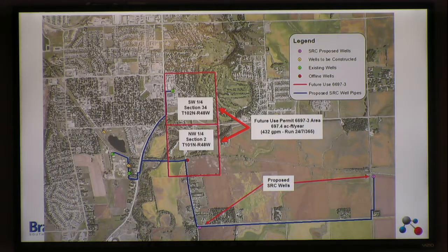This shows the location of the future water rights for the Split Rock Creek Aquifer. And as you can see, if the city intends to move to a different location, the future water right area does not include those locations. So again, there's discussion with DENR, development of appropriate information to enable them to consider additional modifications to water rights for Brandon. The point of that whole discussion is that that is a step that would need to be taken in exploring these alternatives. And it's recognized that that's a normal part of business.